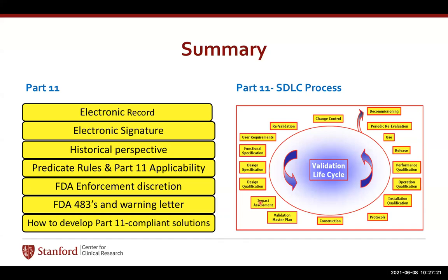And then we have risk assessment here with the clinical research that I worked on to come up with, which is called STRACT, that we can use to do the risk assessment for the clinical trials that we are doing. Then we have to write validation master plan before doing anything, and then start making the device, write the protocol, then do all the things that I mentioned, then release it, and then use it. After that, maintain it. There will be quite a few release notes on that. Then it will be under control.